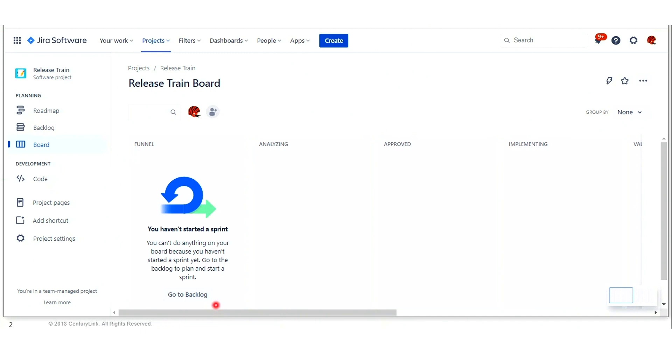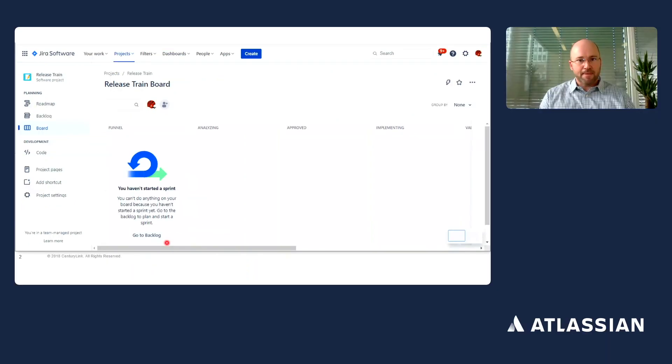We're able to measure both lead time consistently from the time the work entered the funnel until it was done. Likewise, cycle time is measured from the time it moves into implementing until it is completed.